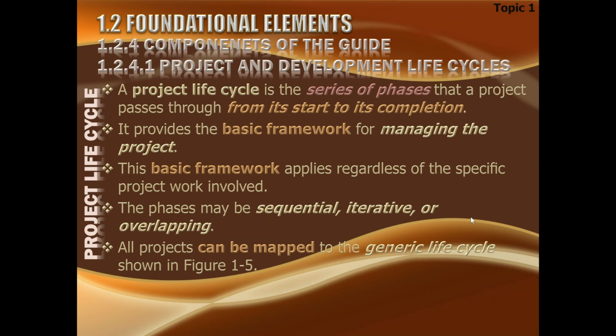And how many fingers do you have? You have 5 fingers in one hand. This is the best way of doing it. 1, 2, 3, 4, 5. But even if you have a more complex project, you may want to have more phases. Let it be 6 or 7, whatever. But do not go into double numbers. Do not go to 10 and above.